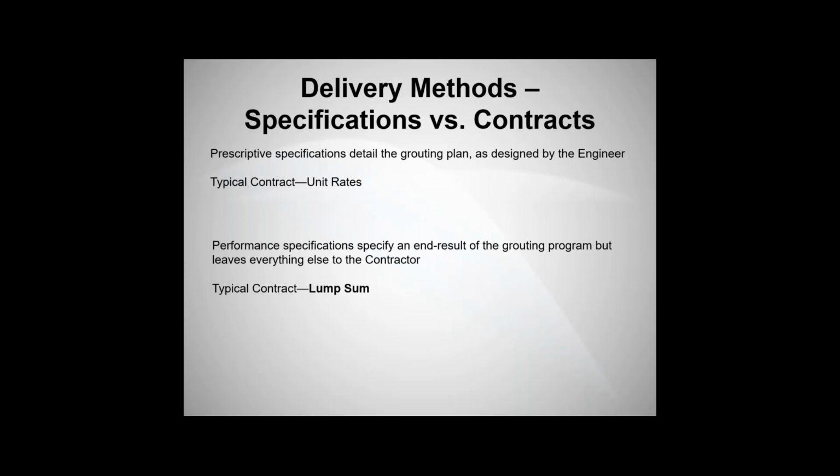Typically, these types of contracts are paid for on a lump sum basis. This is where the contractor owns all of the means and methods and the risk associated with the program working, and a lump sum grouting bid is submitted.